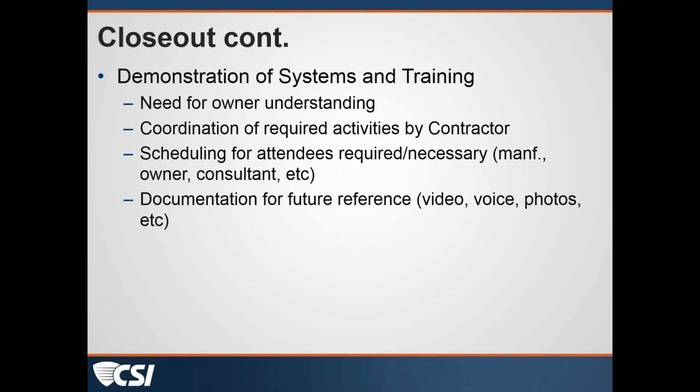Record drawings are the set that I give the owner after I've gotten the contractor's "as-built" drawings and incorporated what he's marked up, including anything that I know of that he may not have marked up, with RFIs and changes, and incorporated those into a set. That set that's given to the owner, that's incorporated all that, is what I call the record drawings.